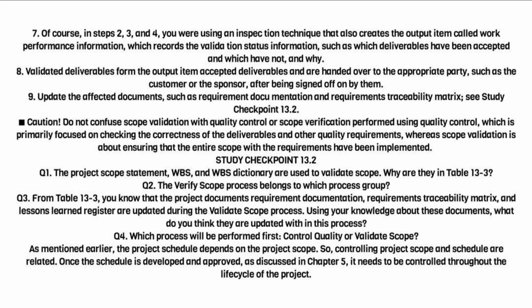9. Update the affected documents, such as requirement documentation and requirements traceability matrix. See Study Checkpoint 13.2. Caution! Do not confuse scope validation with quality control or scope verification performed using quality control, which is primarily focused on checking the correctness of the deliverables and other quality requirements, whereas scope validation is about ensuring that the entire scope with the requirements have been implemented.